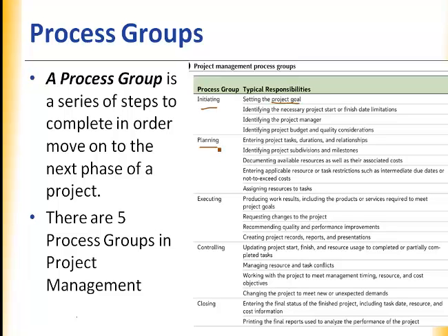Maybe, maybe not. In the executing phase, you're done planning, and now you're working on the project and hopefully staying within what you had planned, but that's not always the case. So the controlling phase and the executing phase kind of are happening at the same time. In the controlling phase, if you said, well, I think laying the network cable is going to take 16 hours, and you find out it actually took 22, you're going to go update your project so that you have the initial project, which we call the baseline, and the updated project. And your timeline may change.